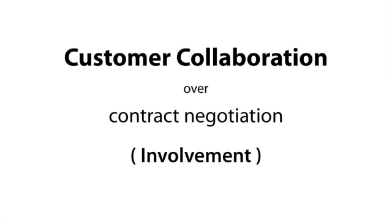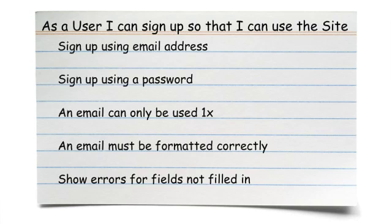Our third value is involvement, which is written as customer collaboration over contract negotiation. There are two big points to cover here: story carding and feedback loops. Story carding is that initial requirements gathering process — it's when we sit down with a customer and figure out what they want and write all of those user stories. A lot of times teams will literally write these on index cards. We'll come up with a stack of these during that story carding process, which can take from a few hours to a few days, depending on the scope of the project.